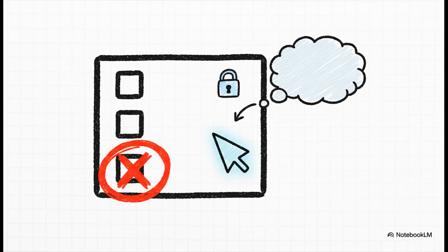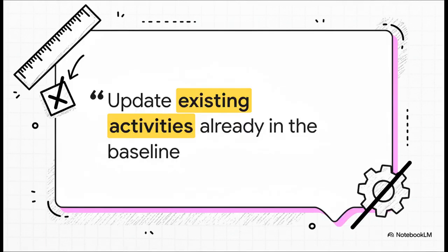Sometimes what you don't click is way more important than what you do. There is one specific box in here that you have to avoid like the plague if you want to protect your original plan. And there it is. By making sure this box is unchecked, you are screaming at Primavera, hands off my original plan.